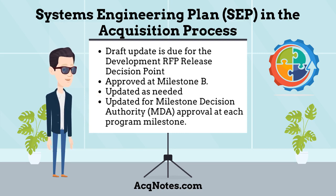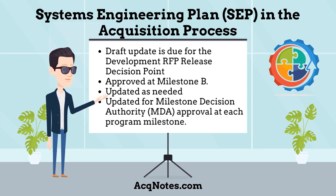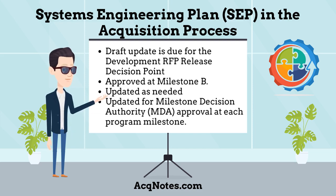Changes in technical approaches stem from the findings and results of the technical reviews, program reviews, acquisition milestones, or other program decision points. The SEP is updated and submitted for Milestone Decision Authority approval at each program milestone.